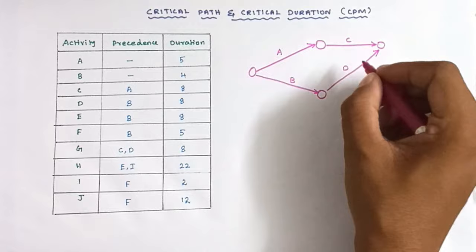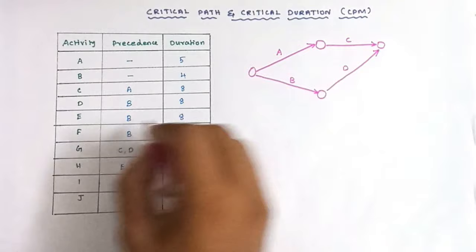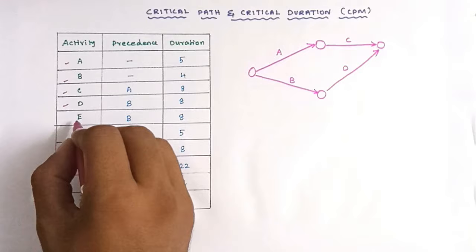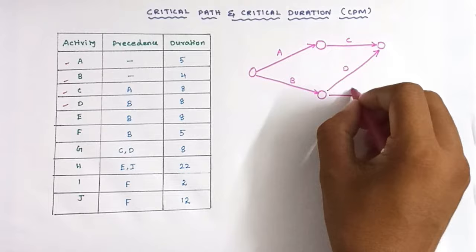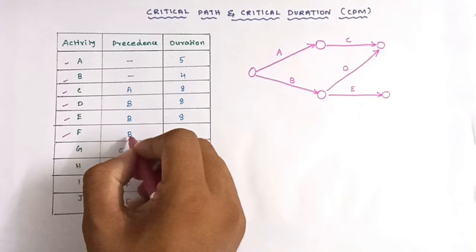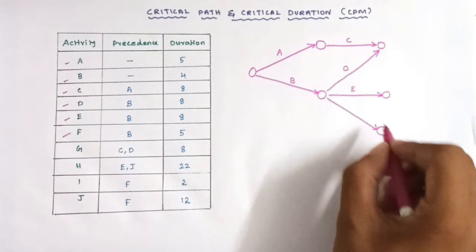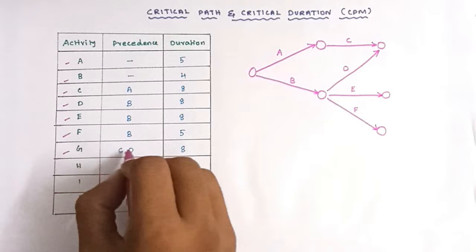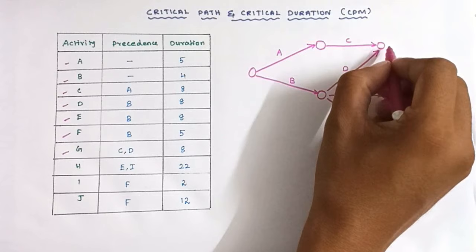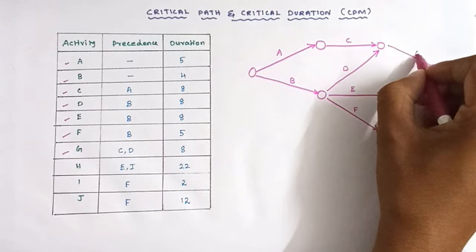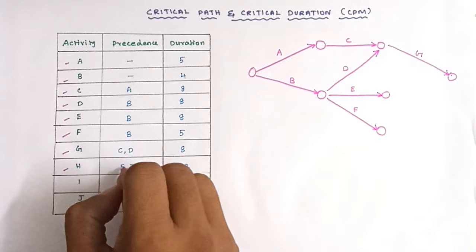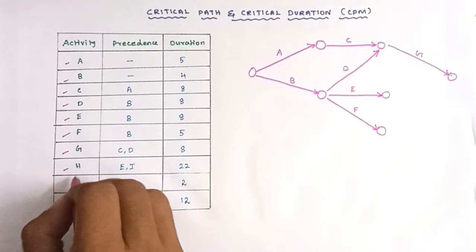After completion of C and D, G will be started. Next, E activity — we can draw E. Next, F — F also has the precedence relationship of B, so we can draw F activity here. Next we draw G activity, with C and D as its precedence. Then for H activity, the precedent relationship is E and I. Since I is not yet drawn, we first draw I — the precedent activity of I is F.